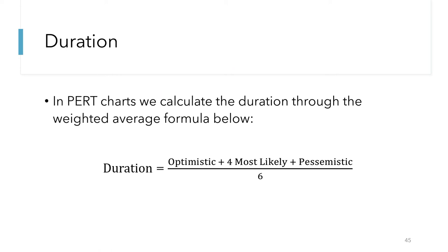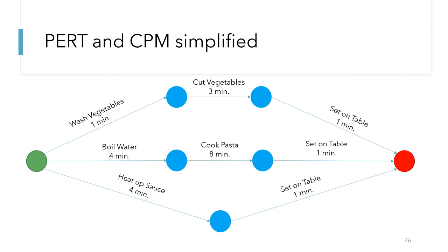To help illustrate PERT and the Critical Path Method, let's think of a simple scenario where you wanted to make dinner. You can see from this diagram how each task is related to one another and what the process flows are. On the top you're making a salad, in the middle you're making pasta, and on the bottom you're heating up some sauce. The critical path here is the middle row — from boiling water to cooking the pasta and setting it on the table — because you can finish making a salad and heating up sauce early, but you can't have a full dinner without the pasta.